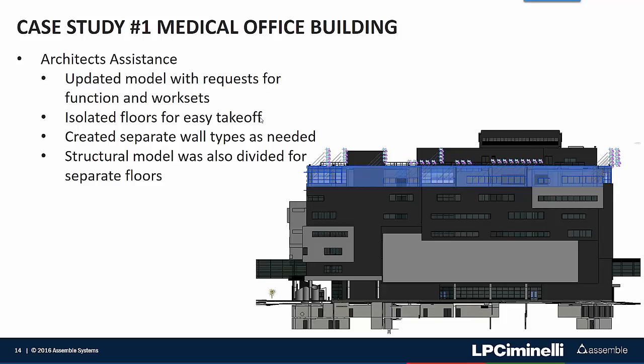The structural model was also divided into separate floors so that when they called and said, okay, we're adding the 7th floor, we got to order the steel, we were able to tell them exactly what they needed within a day or two of request, where the old way would have taken a lot longer to figure that